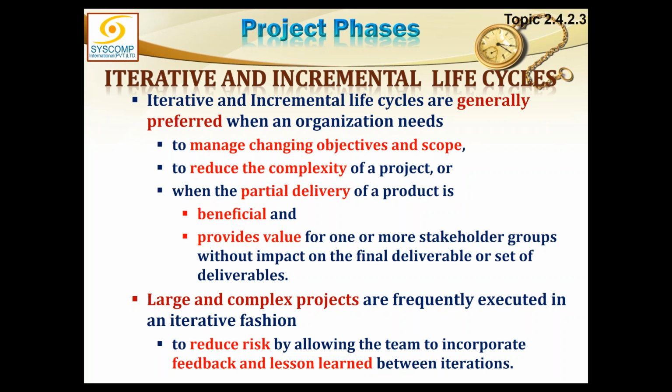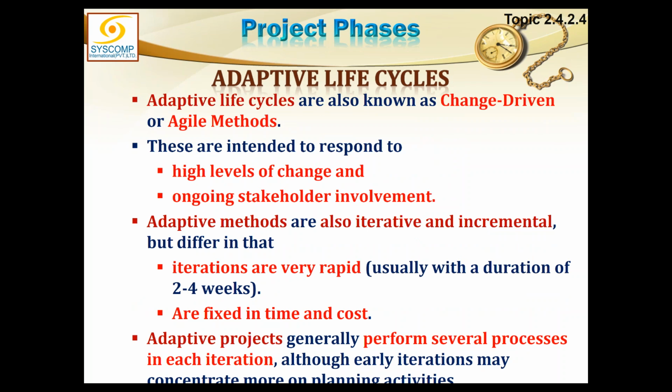Large and complex projects are frequently executed in an iterative fashion to reduce the risk by allowing the team to incorporate feedback and lessons learned between iterations. So we are in constant touch with the stakeholder. At the end of every phase, we are asking for their feedback. We are collecting the lessons learned. We are learning along the way, and we are bringing those improvements in the subsequent phases. So we are being educated throughout the process.